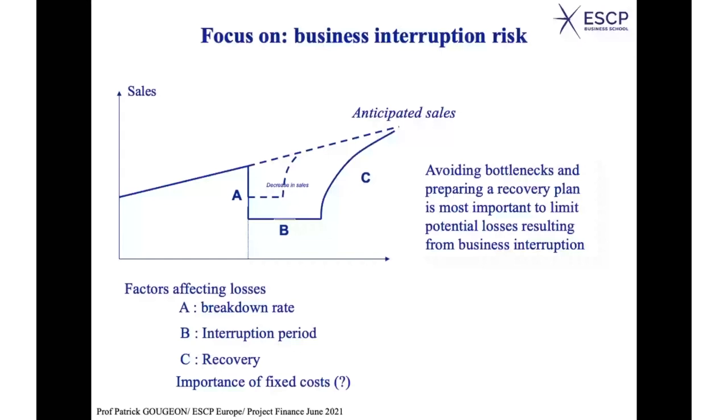This insurance policy actually would provide you with compensation for these lost revenues, and typically to cover fixed costs, the lost benefits, also the lost net income, okay, and sometimes also for extra expenses to recover faster, to accelerate the recovery. For instance, you may need to spend more money to accelerate the transport of a crucial equipment.